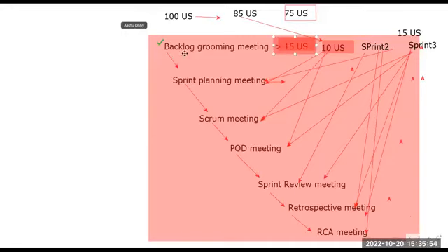You know that we are conducting the backlog grooming meeting, right? Yes. During this meeting, we will pick only those user stories which we can finish in 2 weeks. So these 2 weeks will be completely occupied. It's not like we will do the wrong estimation, or that we complete in 8 days and have 2 days of free time.